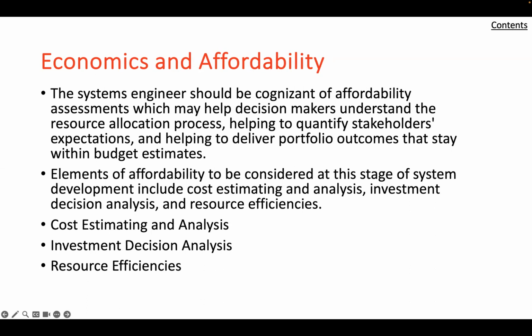So first of all, for cost estimating and analysis, often some initial questions can be asked on how to quantify life cycle costs. The most popular cost estimate is the life cycle cost estimate, LCCE, which provides a cradle to grave estimate. This includes the initial research and development, production, operation and support, and disposal costs.